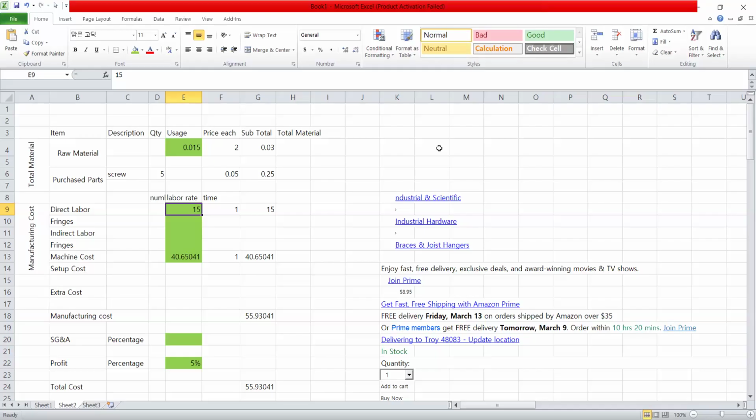And then you take a look at the volume. If the volume is more than $250,000, then you reduce your SG&A and profit, because your profit keeps growing for higher volume and for long periods, multiplied by how many years: 5 years, 7 years, 10 years, 20 years. The more you get this involved, the more different the quotation will be. But this is purely the costing point of view, like Javed Bhai explained to you guys. So keep in mind this is very important.